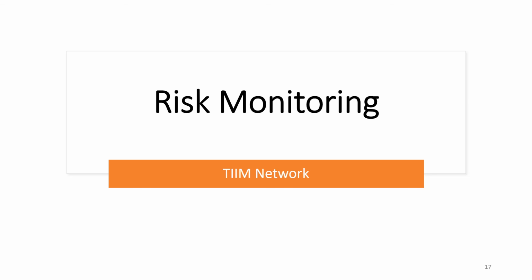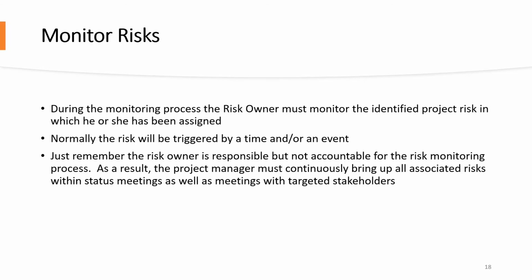Risk monitoring. The monitoring and control phase are contingent on your work performed during the project planning. As a project manager, your primary focus is on the risk owner, trigger, and assurance that your risk owner has the knowledge, tools, and focus to remain proactive within his or her monitoring tasks. Please understand, the risk owner is responsible but not accountable for the risk monitoring process.